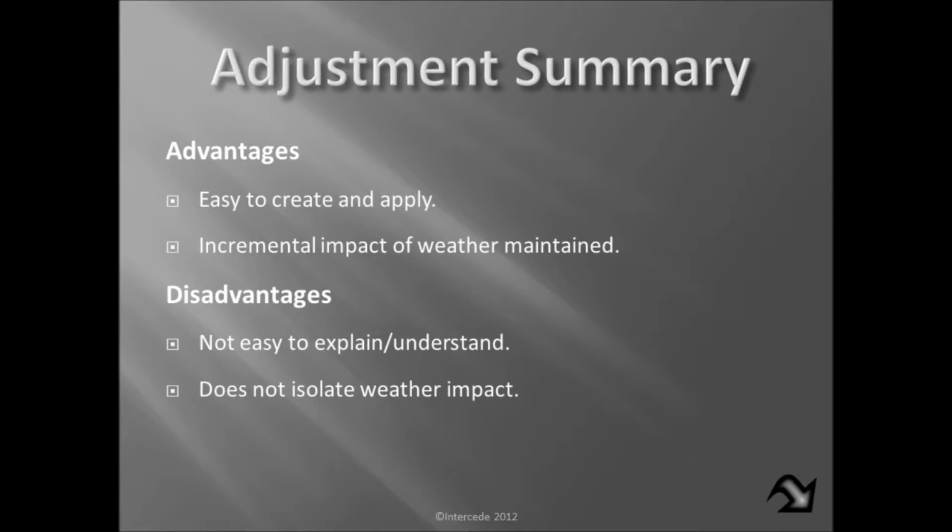Okay, these are the advantages and disadvantages that I see for the adjustment factor. It's fairly easy to create and apply. It maintains the incremental impact of weather. But by the same token, it also does not isolate the weather impact, so it's not obvious to anyone that doesn't see the spreadsheet just how important weather is. And because of that, it's not as easy to explain or understand.